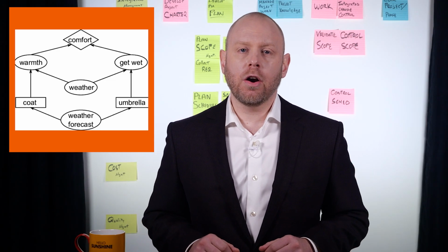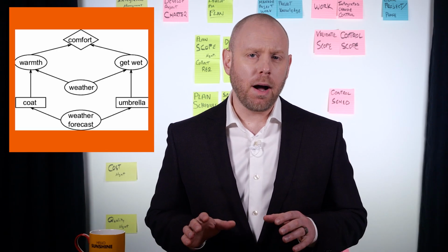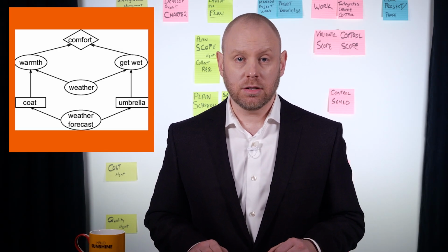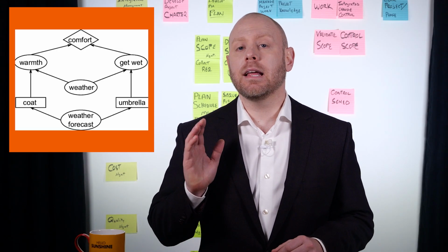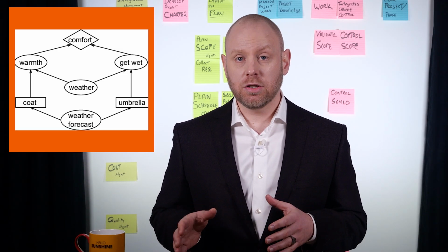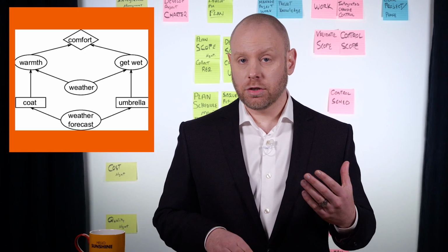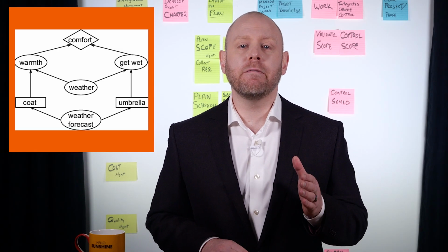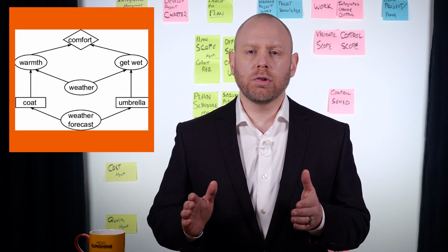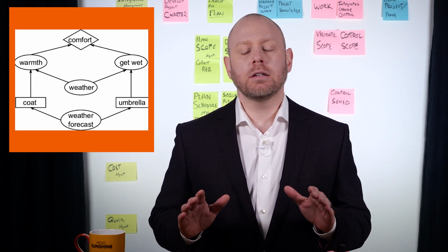Influence diagrams are a graphical aid similar to a mind map that show or illustrate relationships between decisions, uncertainties, and outputs. In this diagram, rectangles represent decisions, ovals, uncertainties, and diamonds, the values of outputs. The arrows just show relationships of influence, not dependencies.